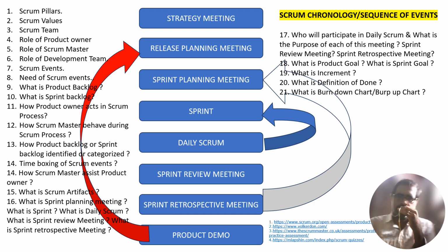Scrum normally engages a group of people who collectively have all the skills and expertise to do the work, and share or acquire such skills as needed. Scrum combines 4 formal events for inspection and adaptation within a containing event, the sprint. These events work because they implement the empirical Scrum pillars of transparency, inspection, and adaptation.